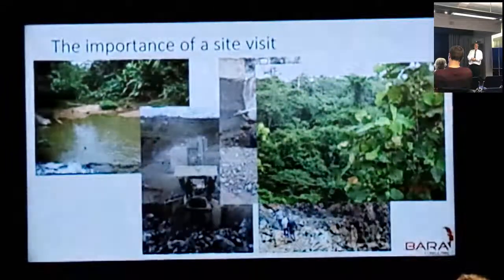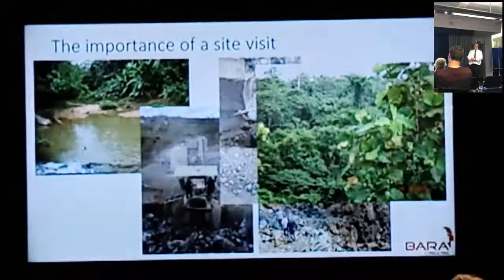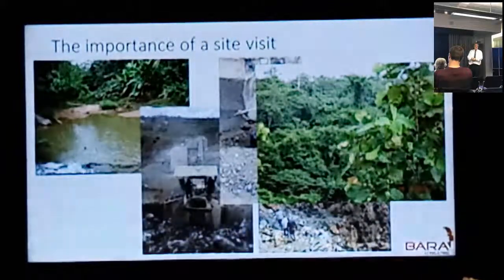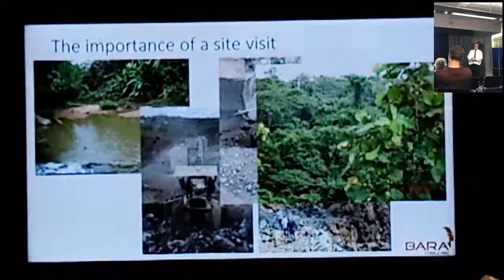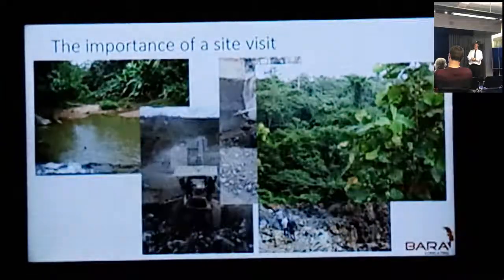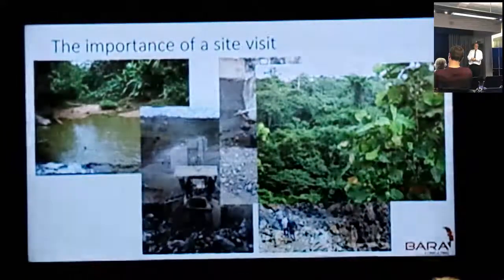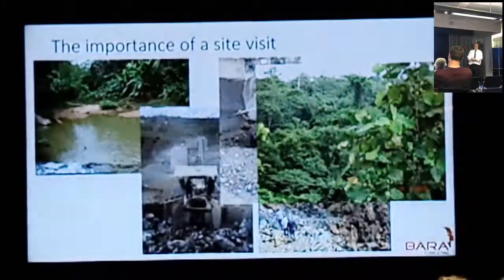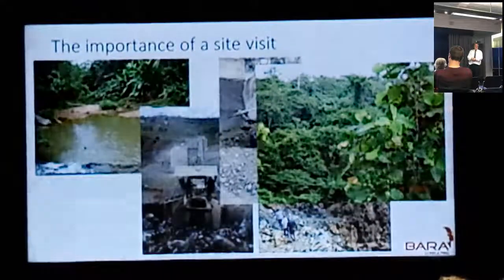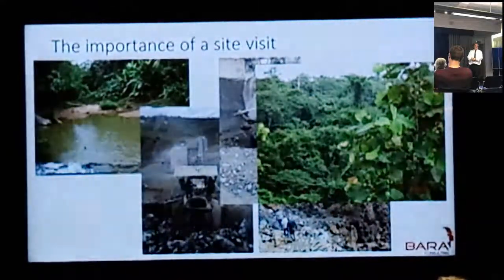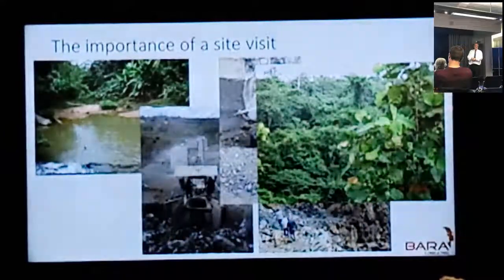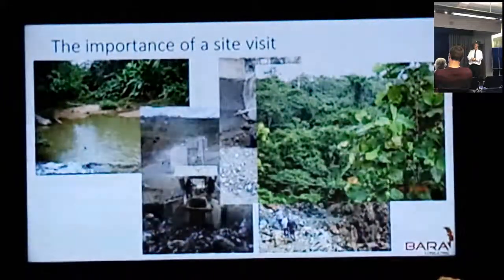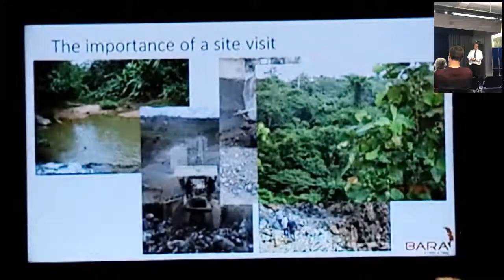This final photo is also in a tropical, hilly environment. They were planning to put in a rail line of about 60 kilometres, but hadn't even surveyed the route yet. It's all private property and they hadn't purchased the land where they intended to put the rail line — yet they were expecting to complete it within two years. We told them to change that to ten years, and in fact we were nervous about ten years — we thought it probably should have been twelve. A mine about 50 kilometres away had a similar problem: they were on year ten and still had two years to go. So ten years was optimistic.